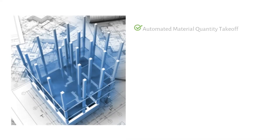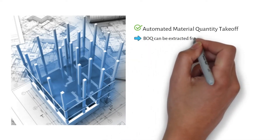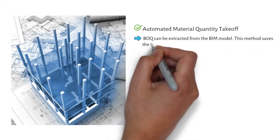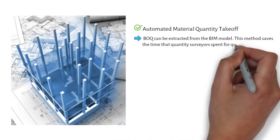Automated Material Quantity Takeoff: In traditional methods, all quantities are extracted from 2D drawings, which is a time-consuming process. Since the BIM model encompasses properties of the elements, the Bill of Quantities (BOQ) can be extracted directly from the BIM model. This method saves the time that quantity surveyors spend on quantity takeoff.